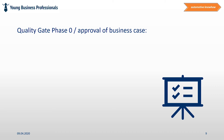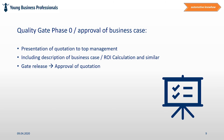Quality gate Phase 0 and approval of business case. In case the RFQ requires high investment or is of significant importance for the organization, the business case is often presented to top management before sharing the final quote with the customer. If investments need to be taken, the account manager presents a return on investment calculation and explains his assumptions for the business case. This might be realized in a so-called quality gate release process that can be counted as an approval of a quotation, in case the company organizes that procedure in that way.